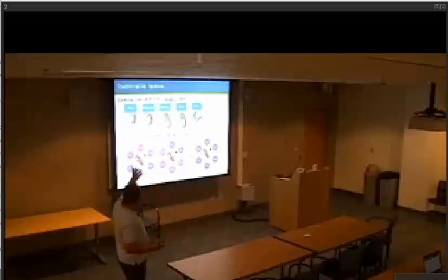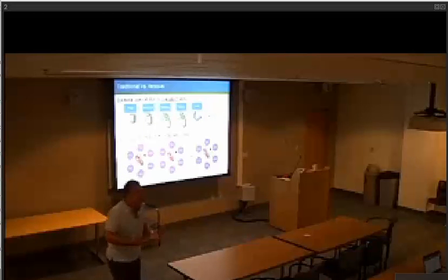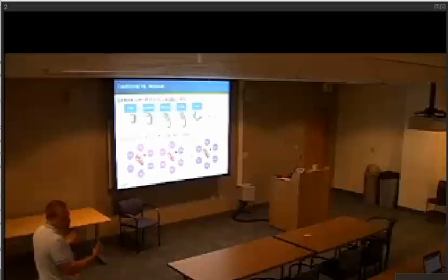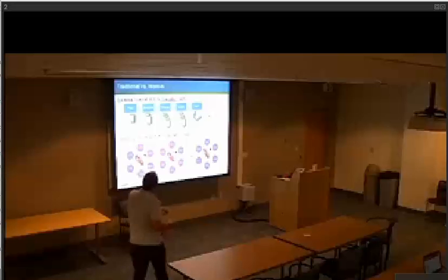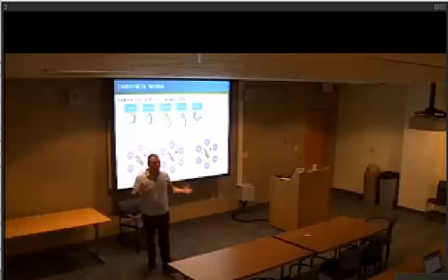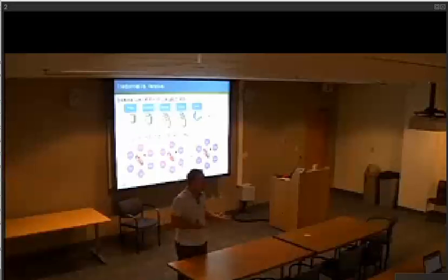Yeah, exactly. The problem, of course, is that this doesn't work in practice. And it doesn't work, by the way, for a very important reason. The requirements are perishable. They change. And the assumption is we found them all up front, which we also know is not possible. So this, by definition, is broken. This can never work. Has never worked. By the way, we insist that it does work and we keep doing it, but that's a different issue.